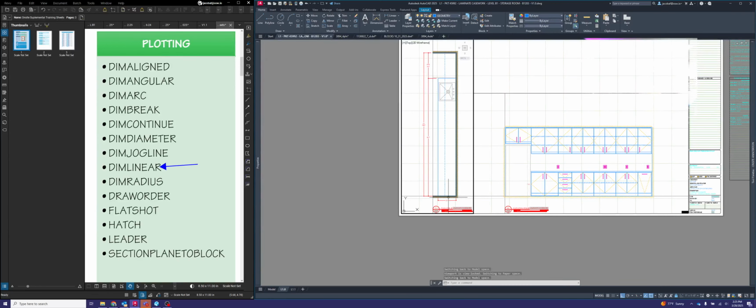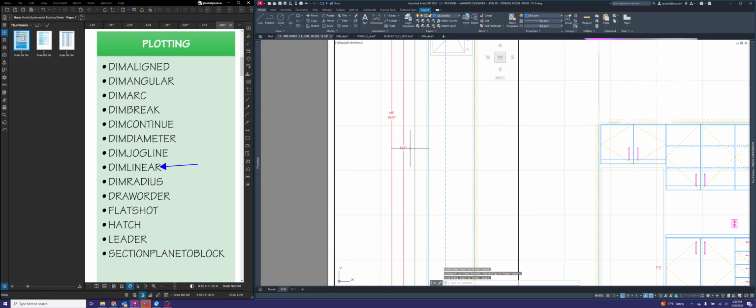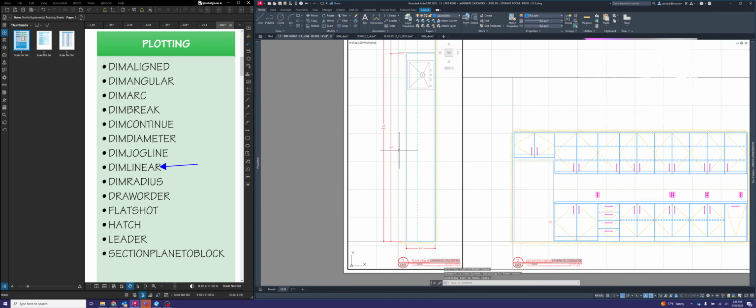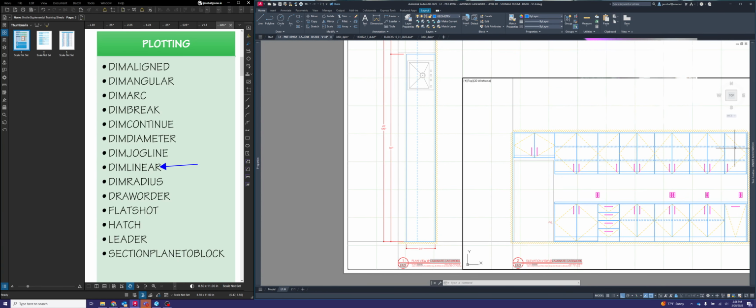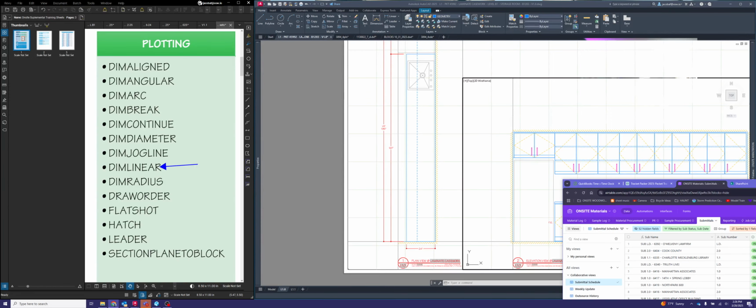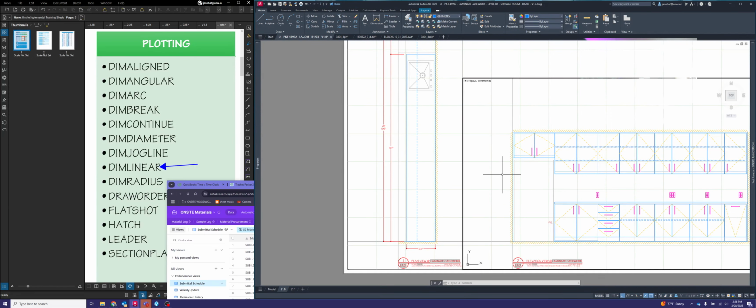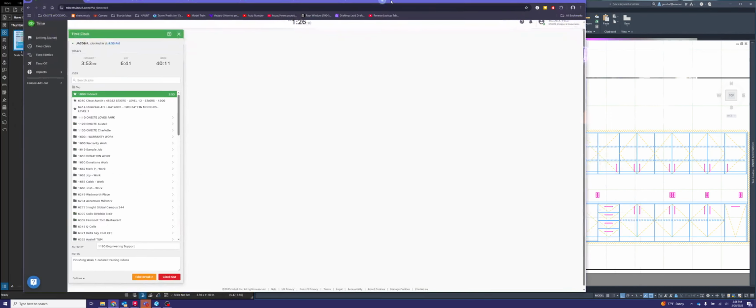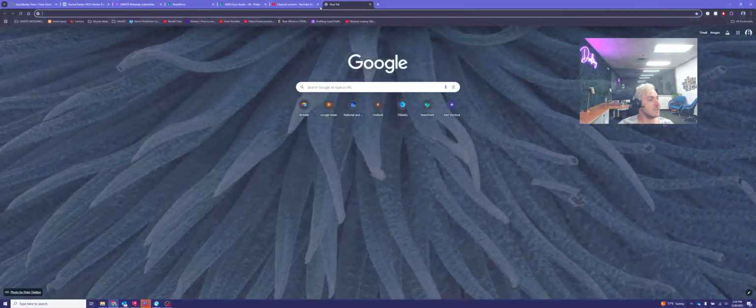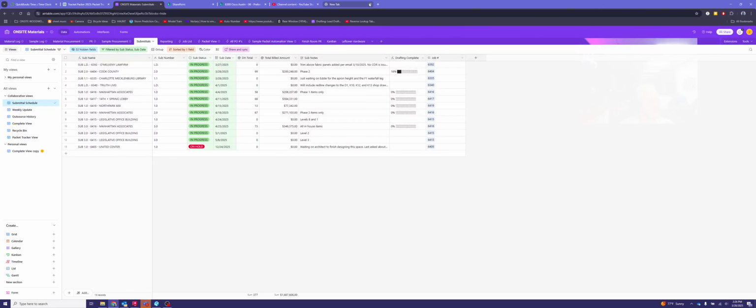All right. Like mentioned though, we do need to add a field joint in the counter, because I'm 100% sure that that stone material that's being used is not going to be 161 inches long. We should confirm with the material log to see what that stone actually comes in first. Sorry, trying to pull that over. I don't know why it's fighting me so bad. Okay, there we go. So let's go to the material log.